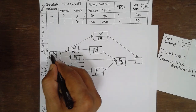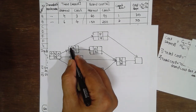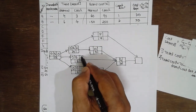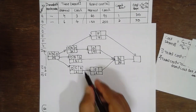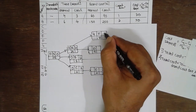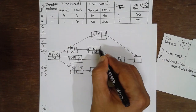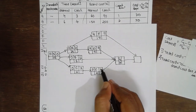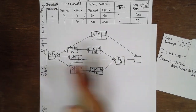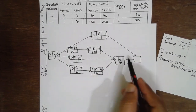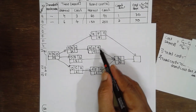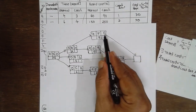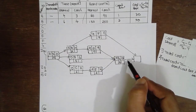For the forward pass, moving left to right: S=0. From S: A gets 0+4=4, B gets 0+6=6, C gets 0+2=2. From A: F gets 4+7=11, D gets 4+5=9. From C: E gets 2+2=4. At the G junction, select the largest value among 9, 6, and 4, which is 9. So G = 9+4=13. At the finish junction, select the larger of 13 and 11, which is 13.